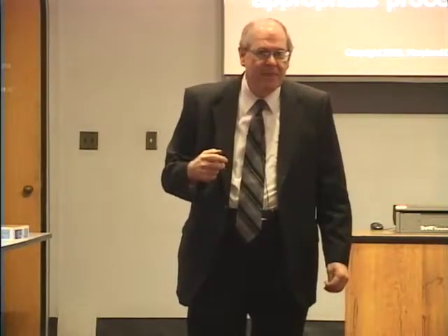Thank you. Yes? Is there a real difference whether you use shall or will? Shall and must, no. Will, again, in the planning class, we don't recommend the use of the word will in terms of a requirement from a vendor. What we say there specifically is will should only be used when it is indicating something the state will do.